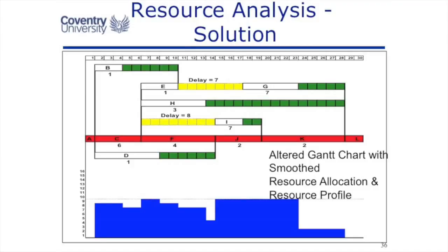Can you imagine me going to management with this resource profile and saying, I need 9 engineers for my project from day 1 to the end? It's a fairly flat profile. Compare that with the previous profile, where I might say, well, I need to start with 6 engineers, then I want to peak at 16 engineers, then I can drop down to, say, 7 engineers, then I need 15 engineers, then I can release them back.